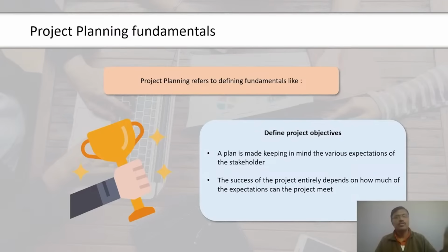The fifth and remarkable step will help us convert this bar graph into a Gantt chart. We will now click on the bars and select the Format Data Series option from the menu that appears. Then in the Format Data Series dialog box, we will select the No Fill option. We can find our Gantt chart on the screen now in accordance with the data that we had entered.